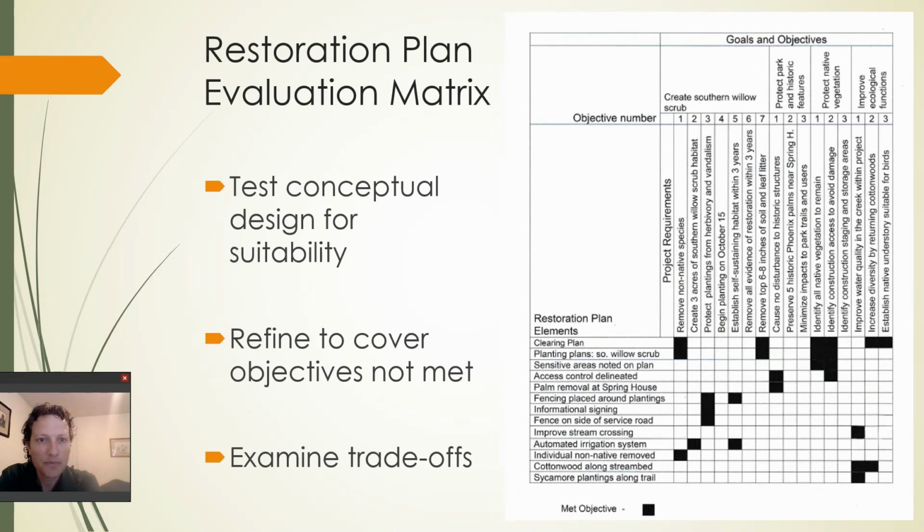Okay, so let's imagine that you have transitioned that bubble sketch into a professional mock-up of the restoration plan. It's important now to revisit the WBS structure, your goals and objectives, your actions, etc., to make sure that the design that was built by your consultant or in-house GIS person accomplishes everything you wanted to do when you set out those goals and objectives and actions.